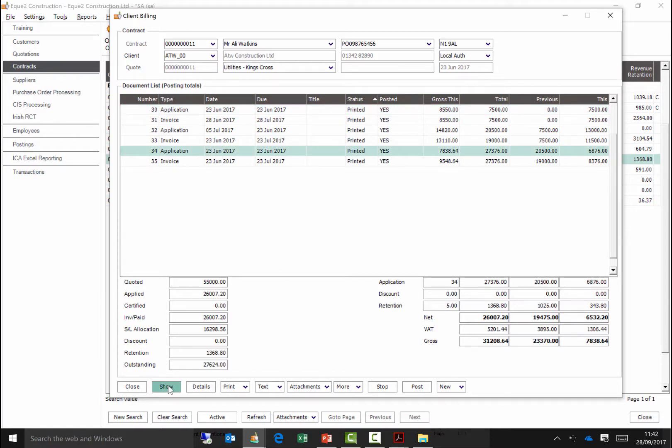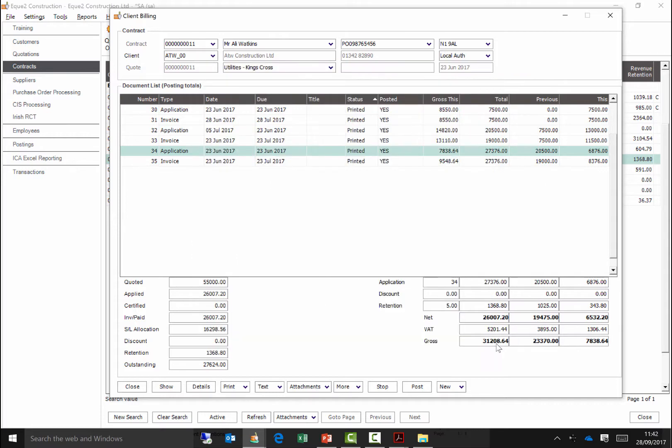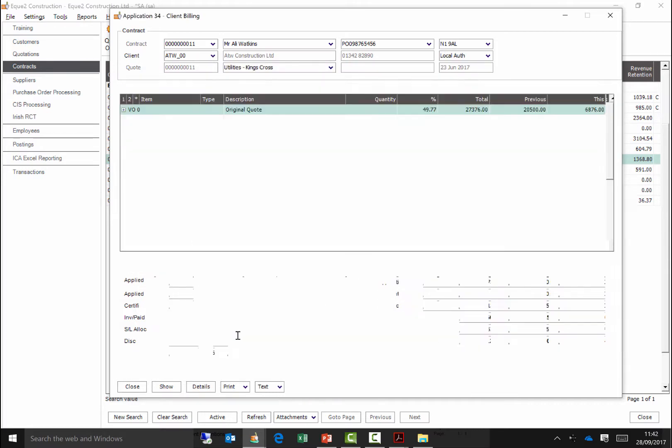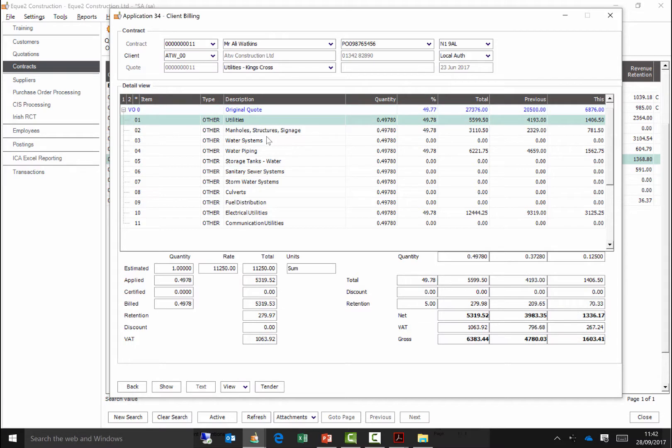Client billing transactions can be entered in a lump sum summarised format, automatically calculating cumulative values and automatically deducting discounts and retentions. Alternatively, transactions can be entered into a detailed breakdown format in line with your cost code structure.